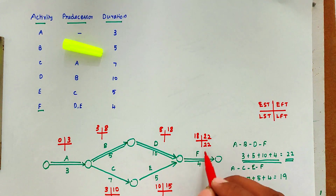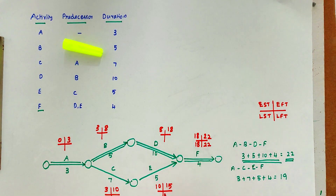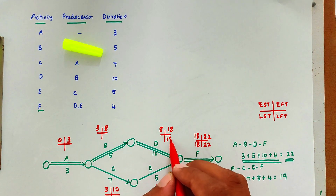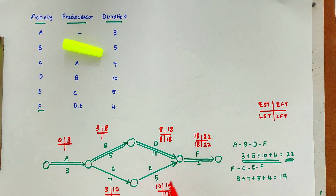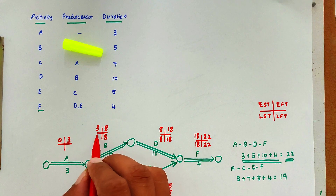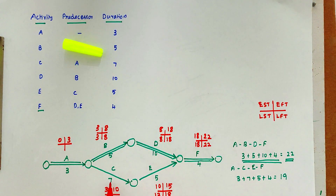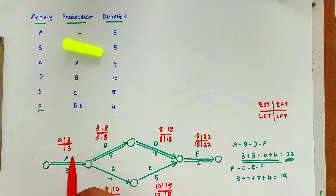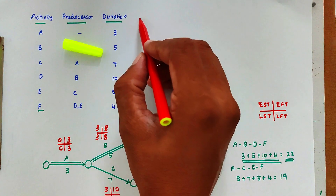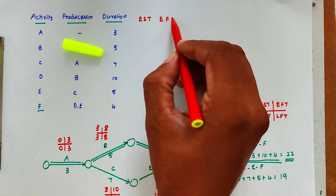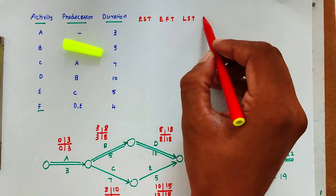Now for the backward pass: 22 − 4 = 18 for the LST of F, so we place 18 there. Then 18 − 10 = 8 for D, and 18 − 5 = 13 for E. We place 13 here. Then 8 − 5 = 3 for B, and 13 − 7 = 6 for C. We take the minimum value at the merge node before A, which is 3. So 3 − 3 = 0.